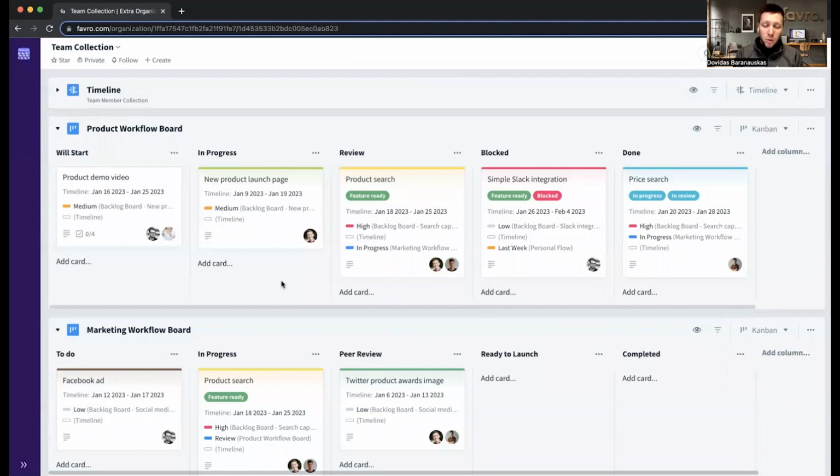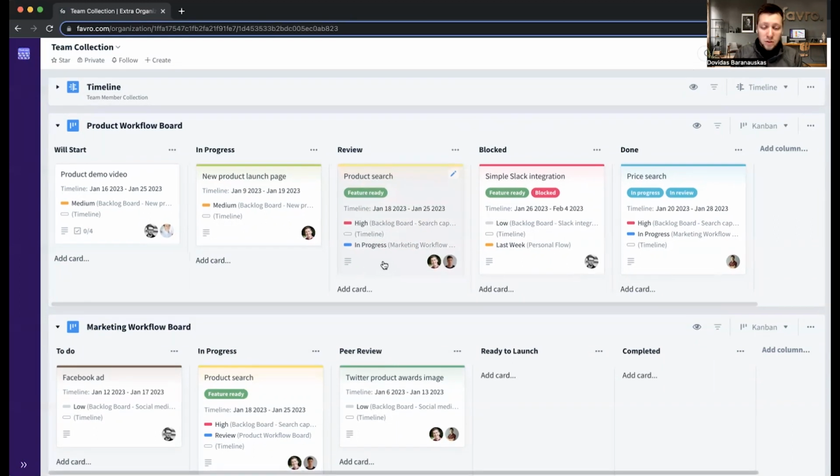And in this situation, we can easily choose automations to inform people when our tasks or deliverables have been assigned into specific stages. So for example, the review stage might be used for a specific person who needs to review our deliverables. And that's important, to always notify the person so that he would be aware of incoming workflow on his side. Now, with that, we can simply create an automation that would notify the member and assign the member to the task when it approaches the review stage.